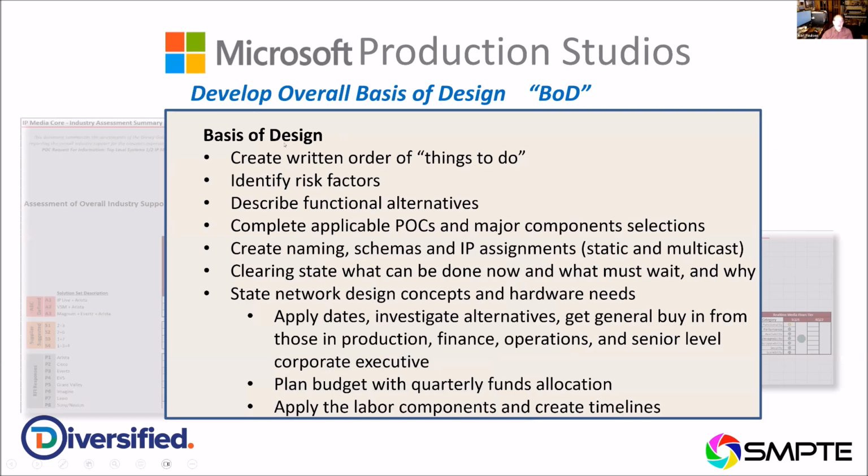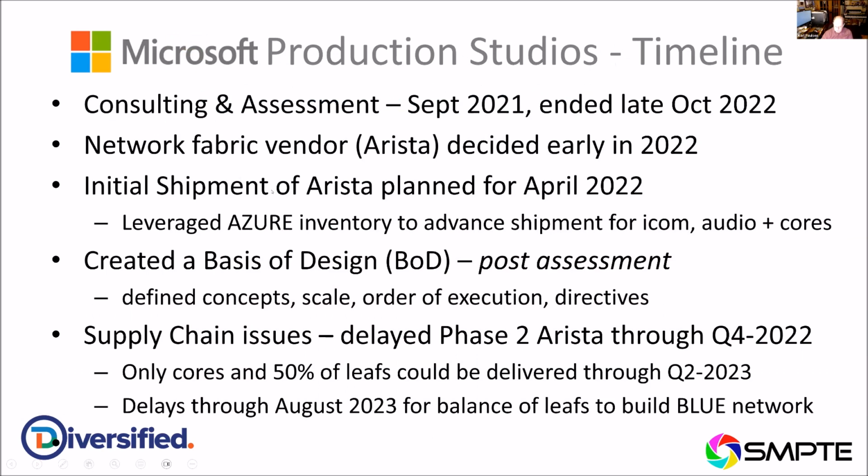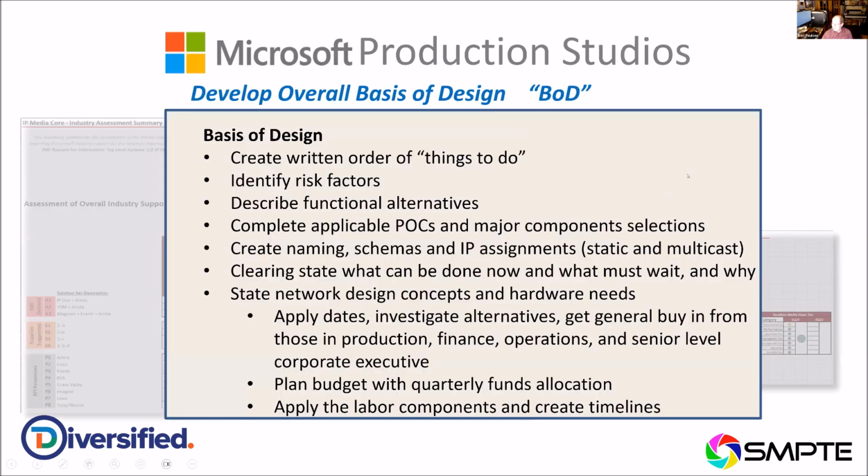The next part after the assessment, and this is also pretty typical of large-scale projects or projects that go on for years and years, is that you create what's called a basis of design, or a BOD. What it contains is a written order of things that you need to do. Side by side with that, you need to identify the risk factors.